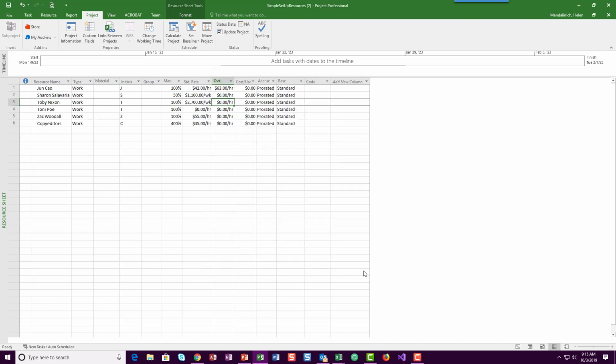And so then we're going to set up some cost resources. So the scenario for this one, I'm on page 97, is that for accounting purposes, you need to track travel expenses in the plan. So remember, costs are different than work. These are things that are a cost that's outside of work product. So we're in that same screen, but we're going to add a new resource called travel, but this time the type of work is cost.